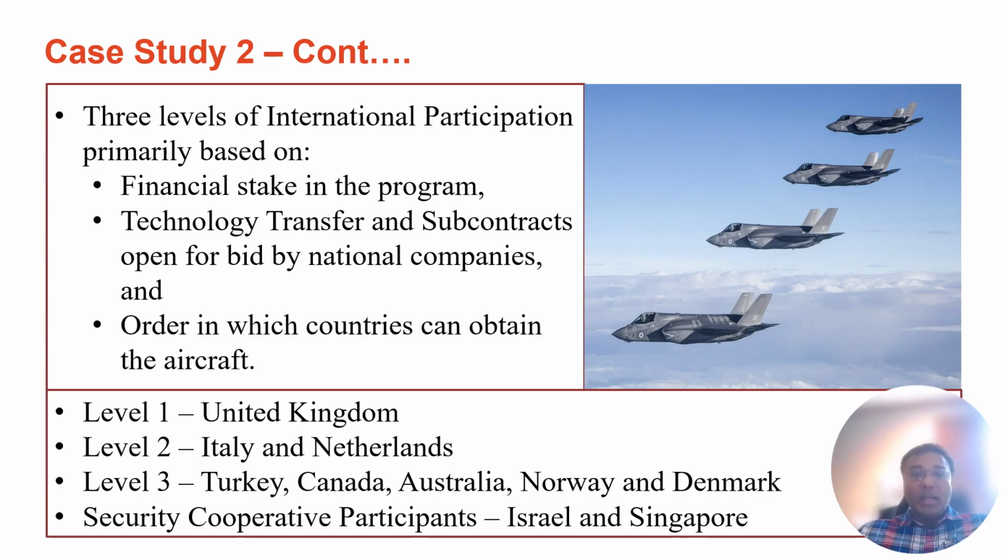So if you think about how they are going to develop these contracting clauses and contracting procurement, with the statement of work and other aspects of what you just saw in the procurement process, those need to be defined and agreed upon by the different nations. So what is the contracting complexity here? The program involves thousands of contracts, a prime contract with Lockheed Martin, which will deliver the airframe, and the engine is delivered by the Pratt and Whitney company, and numerous subcontractors with global suppliers. So this creates a global supply chain management challenge that spans continents, requiring strict contract governance and performance monitoring.